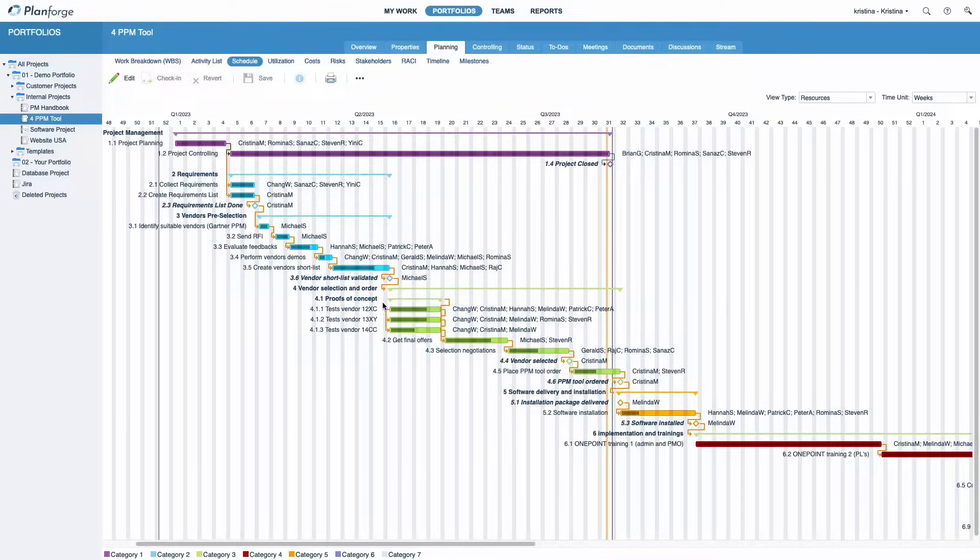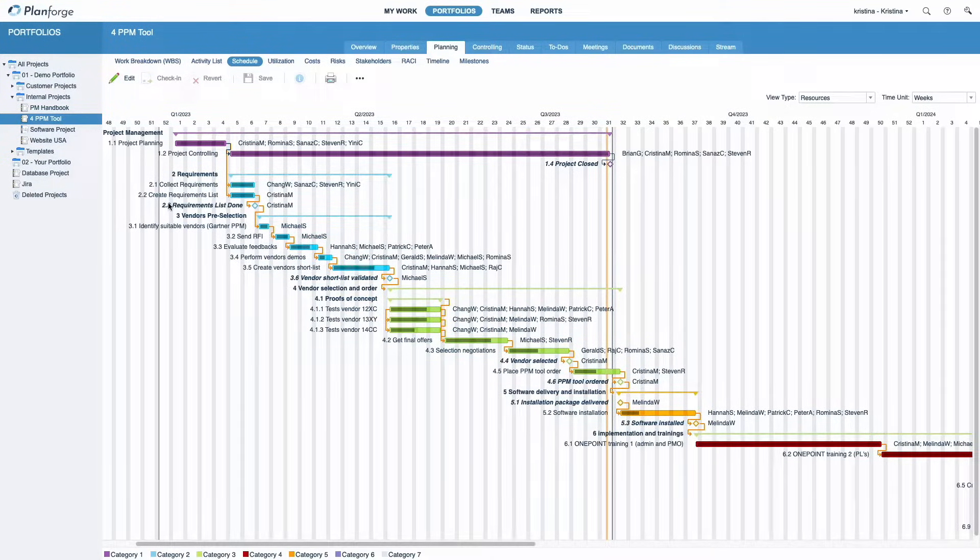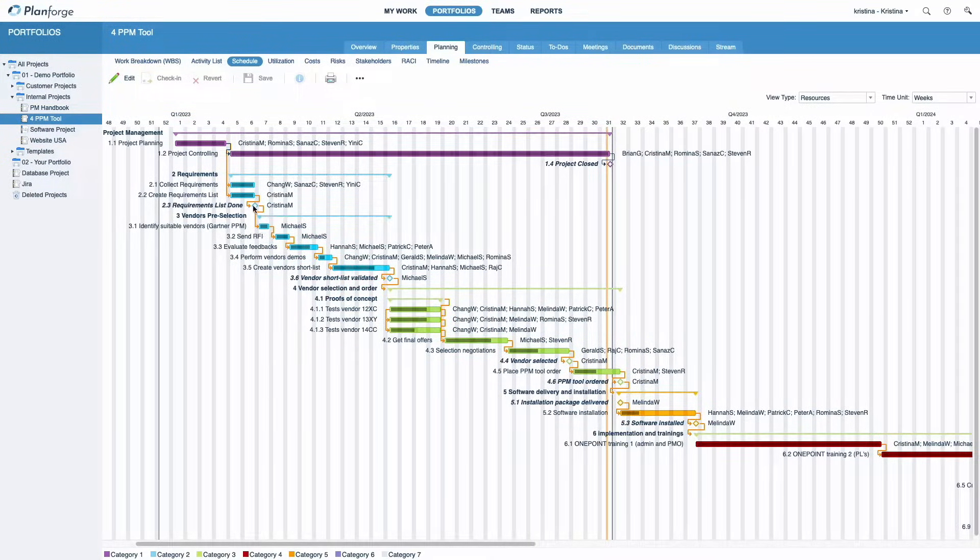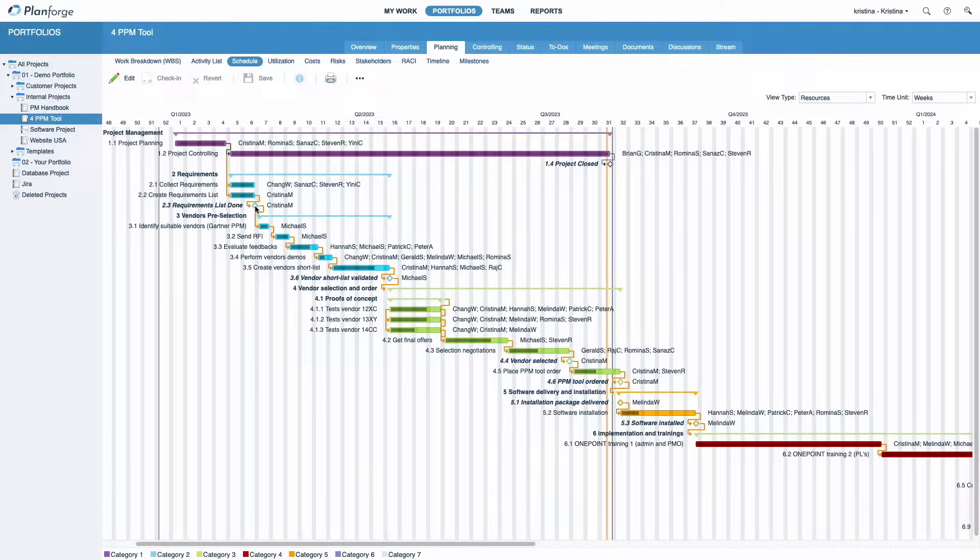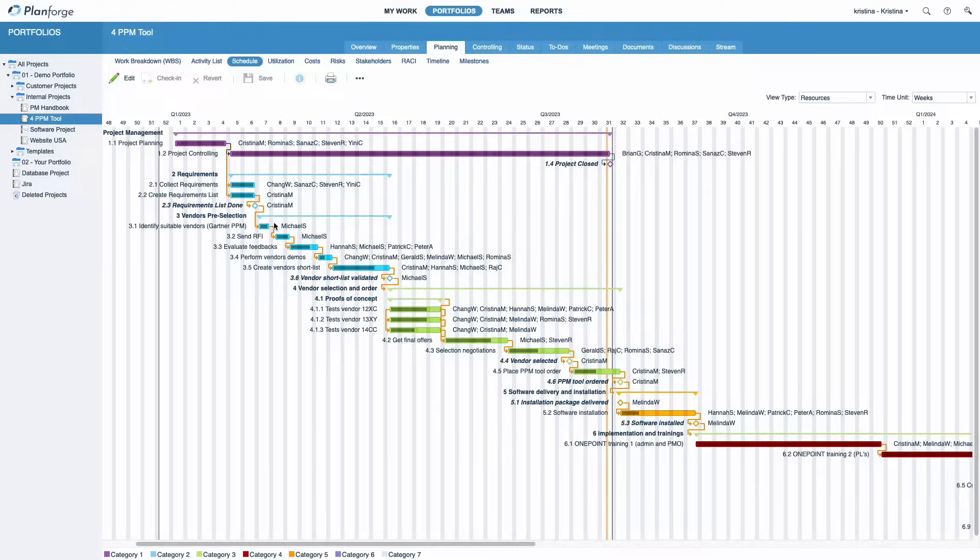The schedule, also known as a Gantt or bar chart, provides a clear overview of all your scheduled activities and milestones with their start and finish dates. Additionally, activity durations, concurrency, and dependencies are visualized.